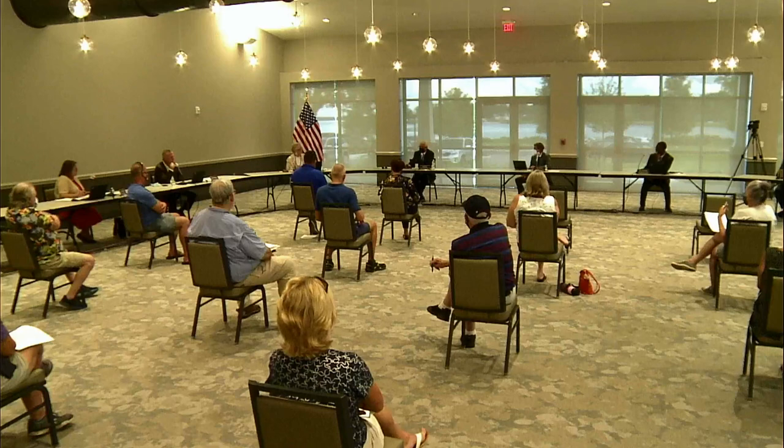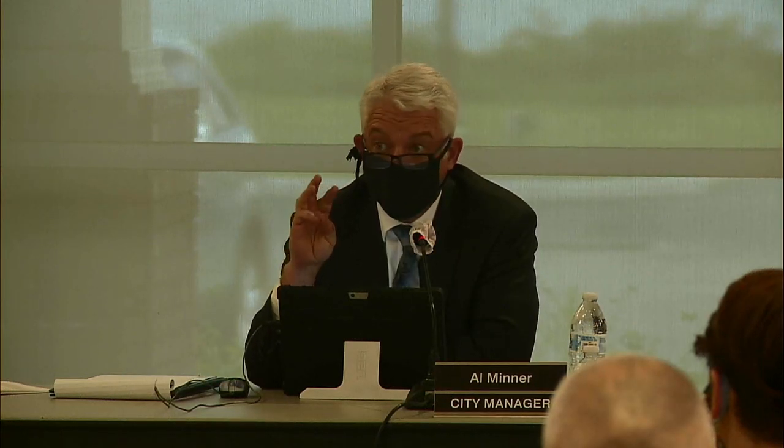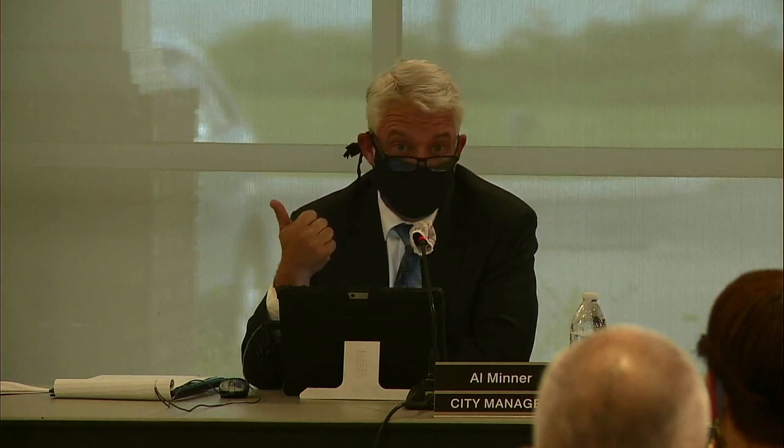No, the first floor contractor came in. I think you were awarded that probably a year ago. And we struggled with that contractor, frankly. I think the total bid on that was about 75, 80 grand to do all three bathrooms, first floor, second floor, third floor. They started on the first floor and went 90, 120 days over their estimate. Ultimately, we put them on notice probably 2 or 3 times during the project. And throughout all the warnings, we finally came to a point where we felt like A, we needed to terminate the contract for cause, and B, they were at a spot where we could stop without any impact to the facility. So that came when they finished